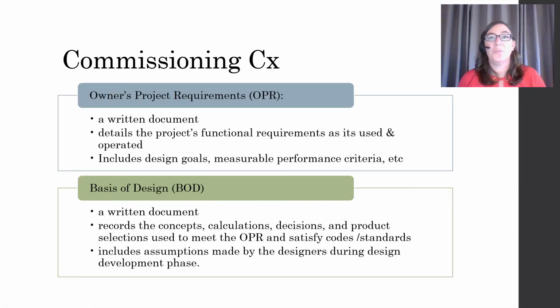Let's define those two terms I used in the last slide. The first one was Owner's Project Requirements, or OPR. OPR is a written document. It details a project's functional requirements, how it's going to be used and operated. This includes design goals, measurable performance criteria, etc.